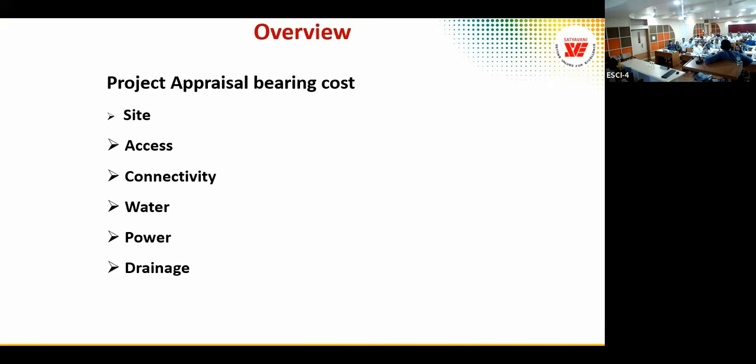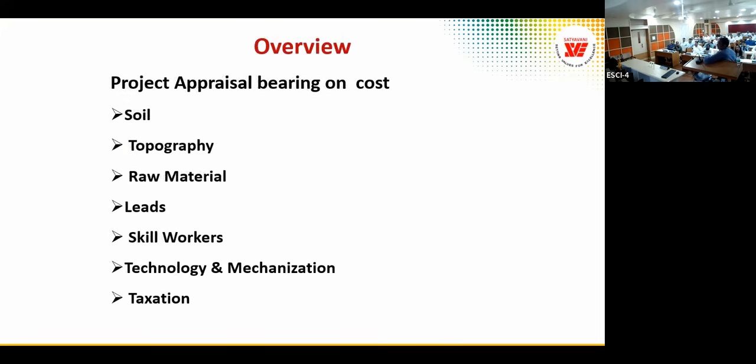Then after the project commenced, when the drains were running full, the client himself sent me a photograph and said, you did a good thing. If these drains were not there, I could not have entered my site. So this is the importance of drainage also. We designed the drainage for after completion of the project, but sometimes you need the drainage even before commencement of construction. So this also we have to study and decide.